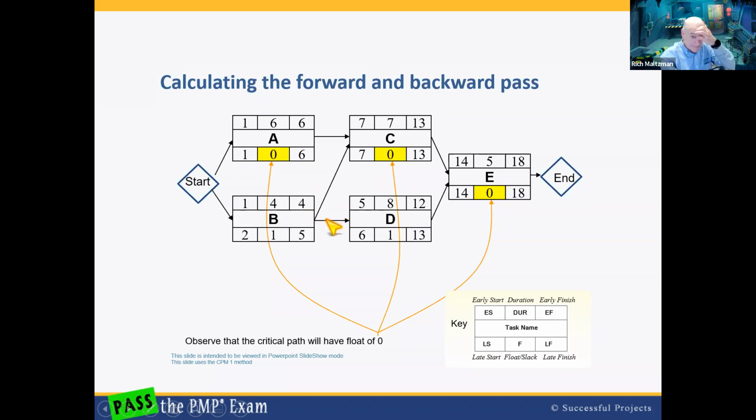If B and D, I think it was Barbara and Diane, are plumbers, and they have some electrical training, you could move Barbara over to Angela and have her help Angela. If all goes well with Barbara helping, this task could be brought in earlier. Now, something to think about. In the real world, does it work like that? Or might Angela feel challenged by Barbara? Might Angela realize, oh no, now I have to train Barbara, and it could actually cause more of a learning curve and a slowing down. But in the ideal world, that's one way you could bring this project in earlier.